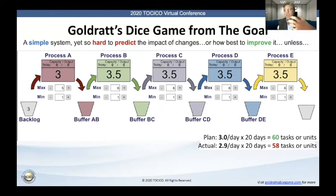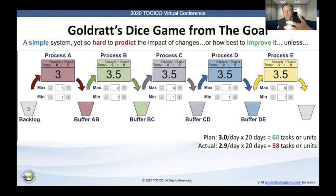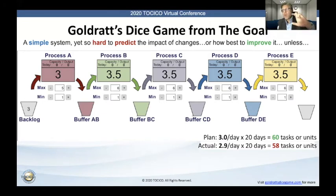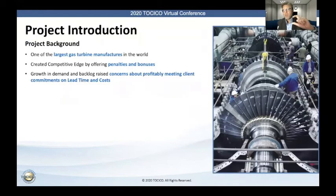That's just an analogy of how the dice game was incredibly powerful to show how controlling the release — choking the release, making sure we're not running at maximum capacity but putting the slowest resource at the front to dictate the pace of the whole system — is a very simple but very powerful way of not just increasing output and shortening the time to achieve it, but closing the dramatic gap between the commitments we've made and our actual performance.